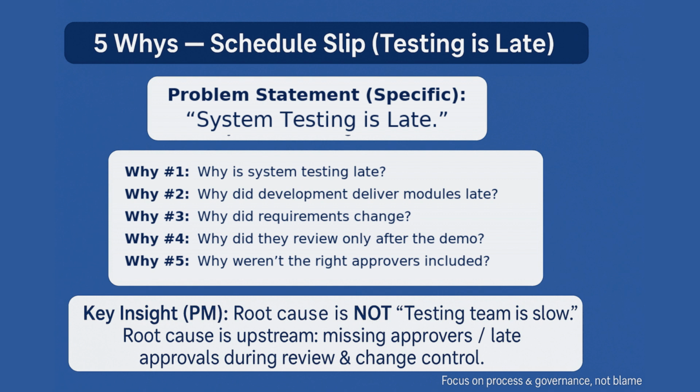There are 3 answers that sound like root causes, but they are not. People were busy. Why were they busy? Not enough time. Why was the estimate wrong? Dependencies. Which dependency? Why unmanaged? Avoid statements like busy or no time or dependencies. You have to go a step deeper. You need to understand the difference between symptoms and root causes.